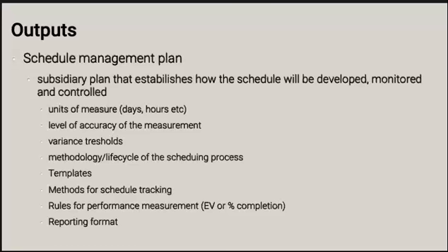I would imagine that it kind of depends on the project. You could make a decision that you provide some variance thresholds for activities if activities may have variances, if you have some levels of unknowns with activities. But I would say that for the majority of projects, variance thresholds should be put around milestones at least, high risk activities, and then the deadlines.